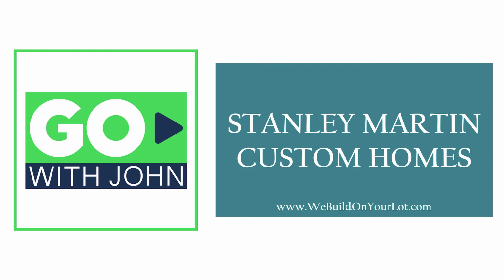After we've had the meeting, we then go and reach out to all the contractors that we need to contact and schedule in order to set up the appointment to come out and do the work. And we'll line a day up where we can go to the customer's home with those contractors that need to do the work and basically take care of any adjustments that need to be done. Gotcha.